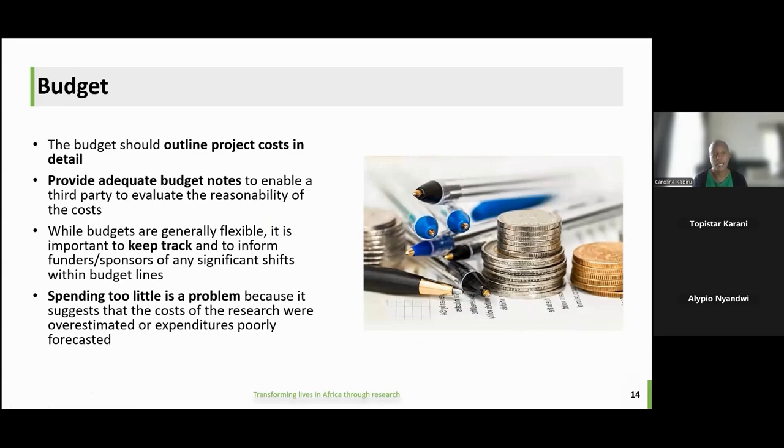In my role, I'm asked to review a lot of budgets, perhaps as part of the proposal development process, or perhaps someone is going into the field and has worked on a budget for the field work. And often, for me, the biggest struggle is when there are no budget notes to explain. So, for example, you might find that there are conference costs, and then for one group of people, the conference cost is 20. In this one, it's 50. What is the difference? So always think about the person who will be looking at the budget without a lot of detail about the context.